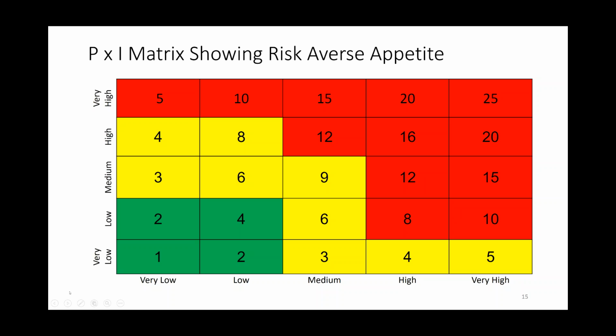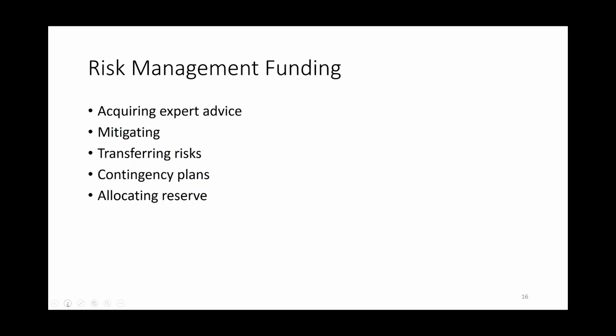Another way of saying that is I have a lower threshold for action, right? Because we talked about thresholds that reflect your risk appetite. So I have a lower threshold of where I need to take action. So on this one, any combination of high probability and low probability with high impact says that's a high risk. Even if it's a low probability that I could have a high impact, I'm considering it a high risk because I can't let something happen there. Okay, let's go to the next slide.